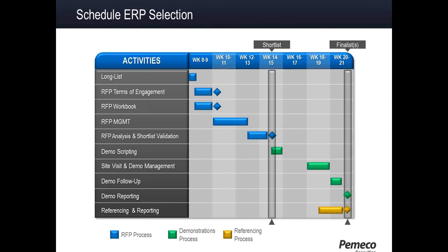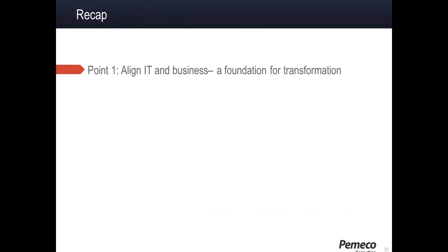And so, from assessment all the way to the end of selection, including contract negotiations, you're probably looking anywhere between a 3 and a 6 month project, sometimes longer. We've done them shorter, but seldom, and there are all kinds of iterations. But again, your requirements are going to determine the extent of the selection project, and that has to be figured out on a case-by-case basis.